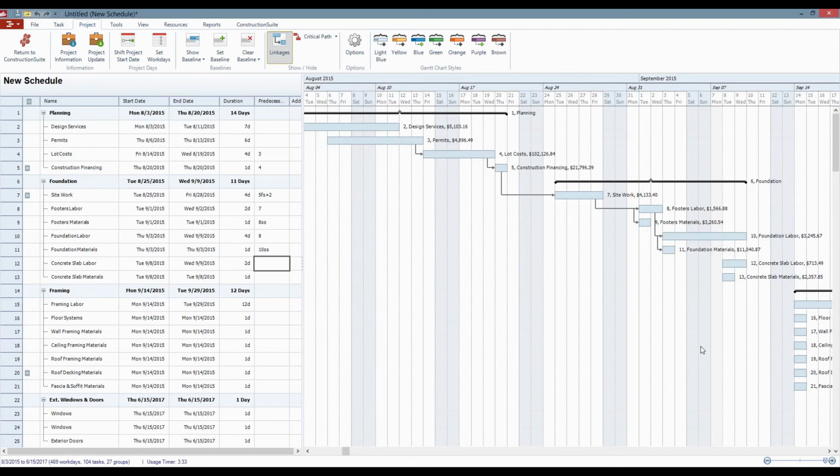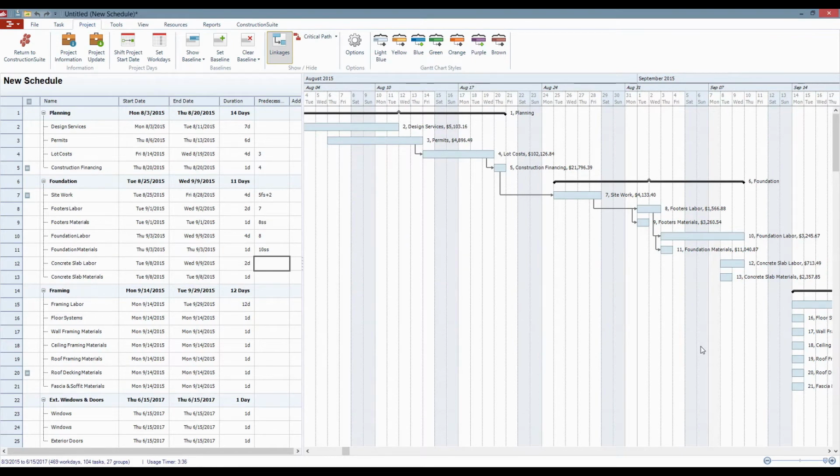When you click OK after making those adjustments, the schedule is going to automatically compress or expand depending on what kind of availability we have for these tasks. So that's an easy option in there as well. The rest of this, though, is going to be based off of the relationships that you're creating in there and the duration for the tasks and what you have mapped out on the schedule itself.